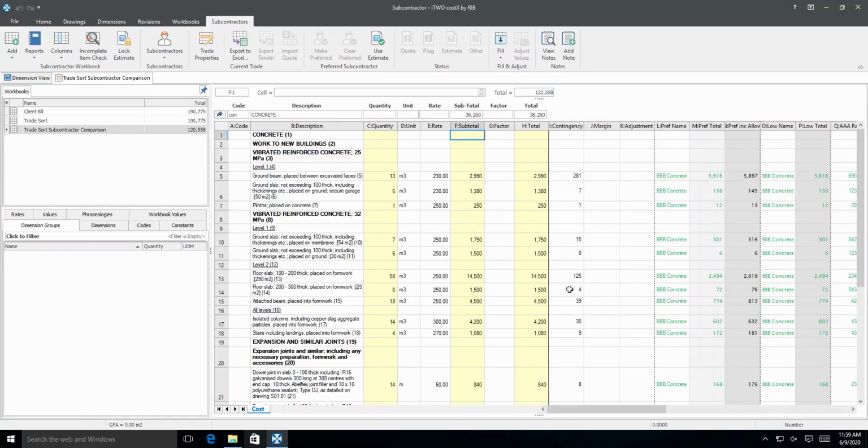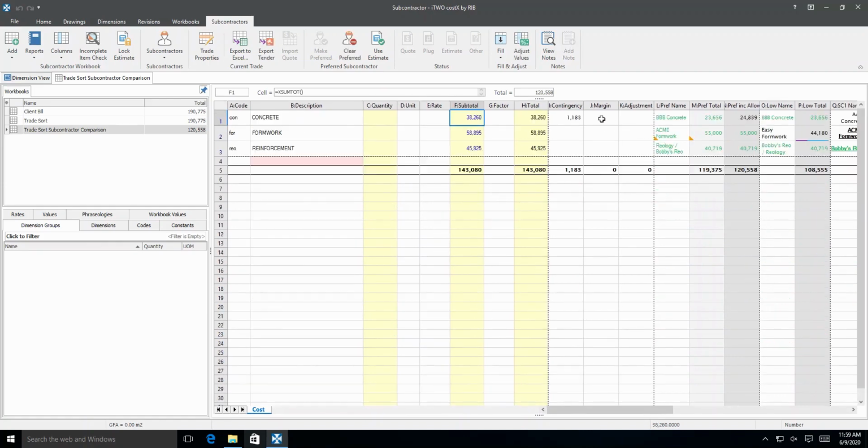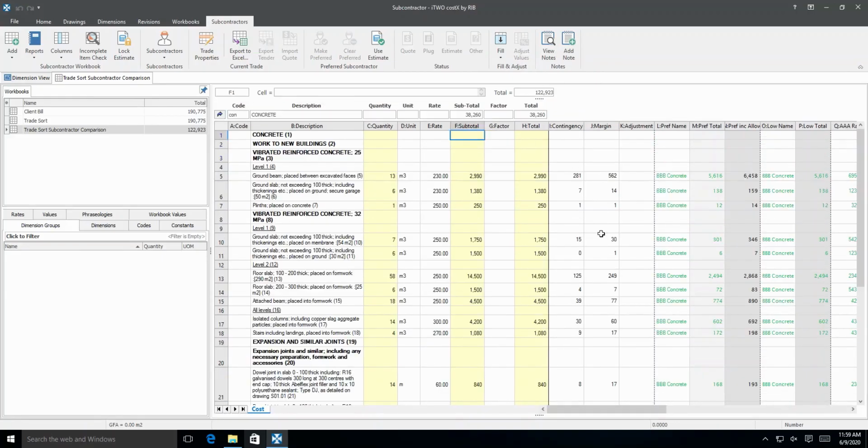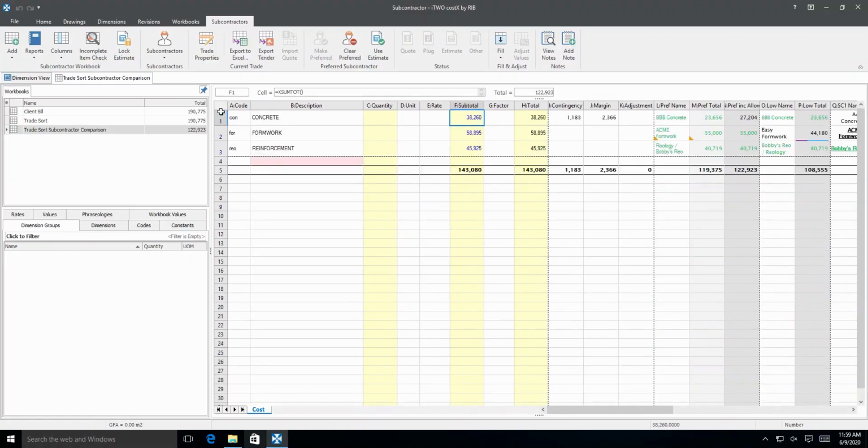Drill down to verify this has occurred. Then for the markup column, use the same function, but this time use a percentage of 10. Notice that the formula has been entered on level 2 and totaled automatically on level 1. For the adjustment column, use the fill with lump sum function again to spread 1000 over the cells. Drill down to level 2 to verify this has occurred.